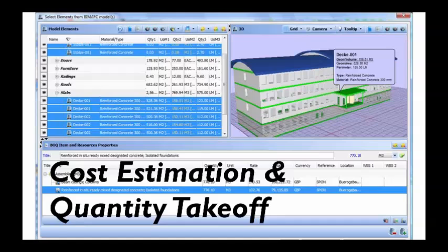Now, what usually happens is something called quantity takeoff. And again, if there's no contractor on board yet, then a third party consultant might be hired as the cost estimation consultant. There are cost estimators that you can hire to review all of the documents that you have and see where you are in terms of cost and budget.